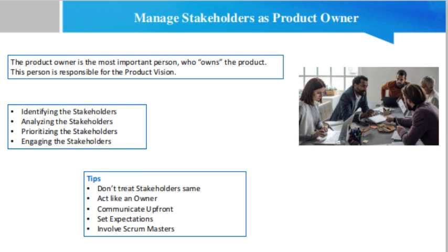Reviewing the stakeholder management process. As we got an idea, a stakeholder could be someone who would either support or someone who would oppose. The process of managing these stakeholders is the stakeholder management process. It involves managing their expectations, communication, and requirements. It involves four different steps. The very first step in the stakeholder management process is identifying the stakeholders.